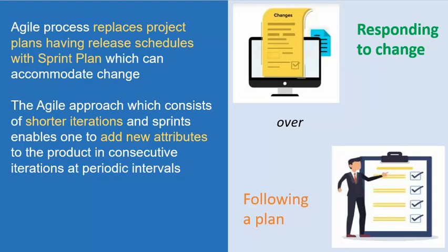So if there is a myth that planning is not done in Agile, no, we do plan everything. We plan for requirement clarification, which is basically the sprint grooming session. We do sprint planning. We do sprint reviews. We plan for the capacity, and as per the capacity, we load the sprint backlog. Planning is there in Agile, but heavy planning is not done upfront as it is in other methodologies like waterfall. Other than small plans, we inspect and adapt, and if there are changes, we accommodate them in the upcoming sprint. That's how these small plans help.